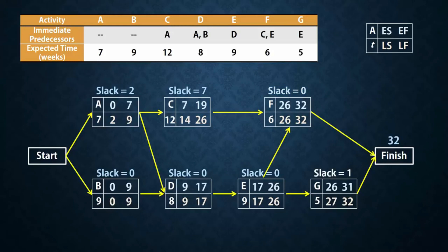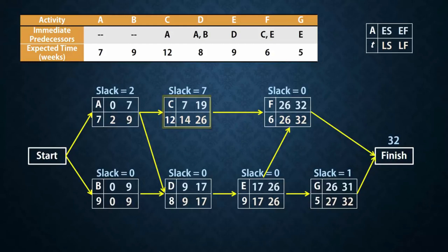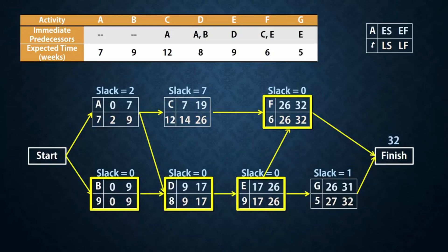Note for example that activity C can begin any time between week 7 and 14, and it can finish any time between 19 and 26. Thus C can be delayed for up to 7 weeks, and the project will still be completed in week 32. Activities B, D, E, and F on the other hand cannot be delayed at all without extending the project's completion time. So for example, if D is delayed by 2 weeks, then the project completion time will be extended by 2 weeks as well, from 32 to 34.